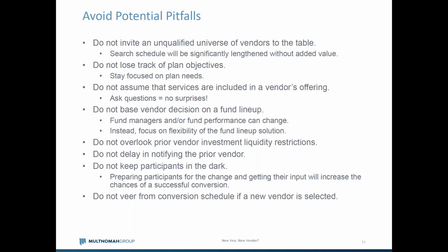Don't overlook any liquidity restrictions. This is part of the notification that I mentioned with the existing incumbent vendor. If the existing investment options have any liquidity restrictions, it's important to understand that at the outset, and also why it's important to notify that vendor, so that you can get the clock started on some of those things that have a 12-month put or a certain number of months or years before they can pay out.